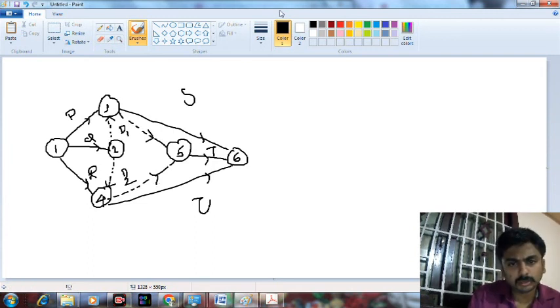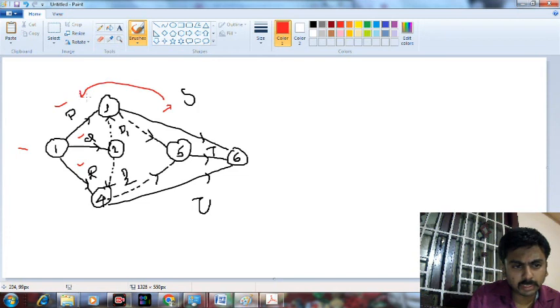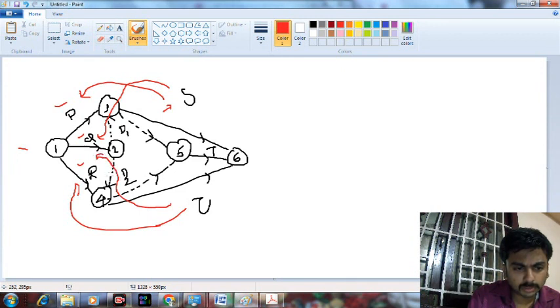So now we can verify. P, Q, R have no predecessors. S has predecessor P, and S through this dummy activity has predecessor Q. U has predecessor R, and U also has Q as a predecessor through this dummy activity.